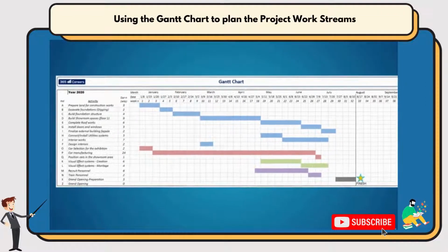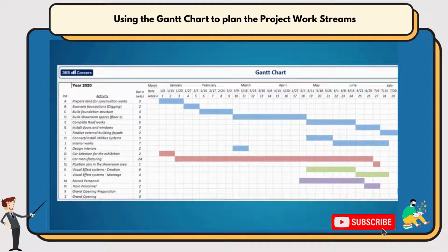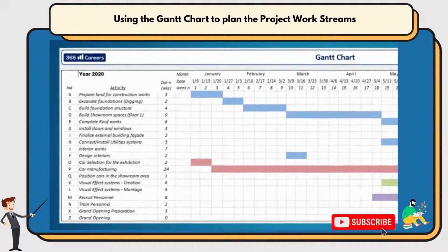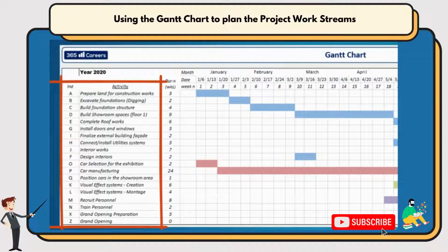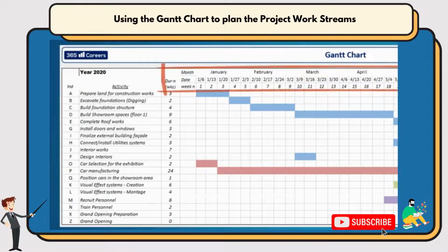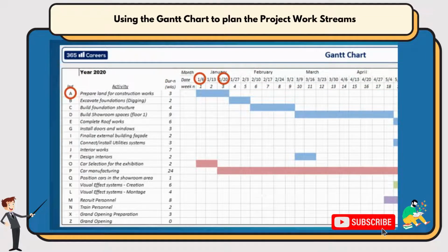The Gantt chart represents something very simple, yet extremely useful. It lists all the activities from our activity list on the y-axis of a table. A calendar with days, weeks, and months is positioned on the top of the table, the x-axis. The durations of the activities are drawn right below the calendar day. You can now see the start date and the end date, with the difference equaling the duration of the task.